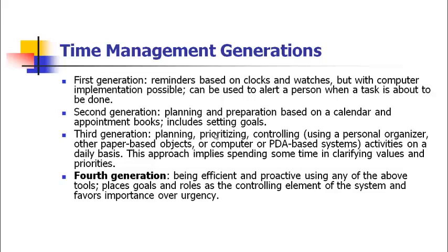If you are carrying out any project, then the project has n number of activities, and some activities are dependent on others, so they create paths from project start to end. If, say, 8 different activities are happening in parallel, then 8 different paths will get created, and on each path there will be multiple activities. Out of each path, the one which takes the maximum amount of time is called the critical path.